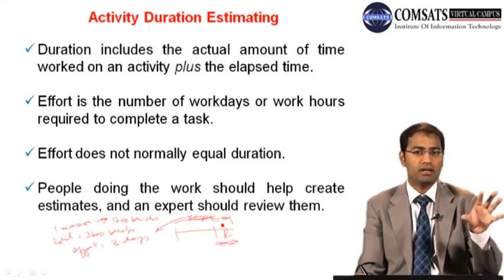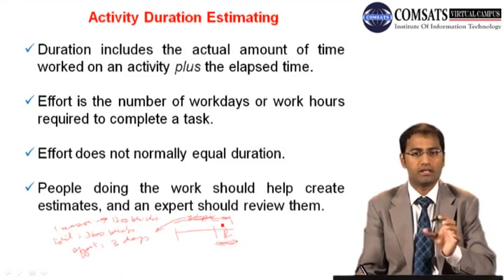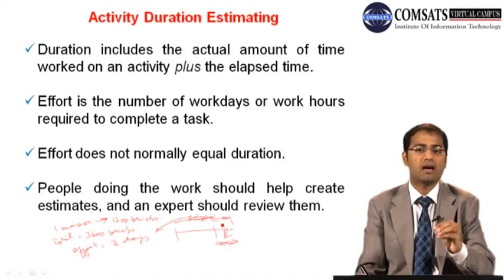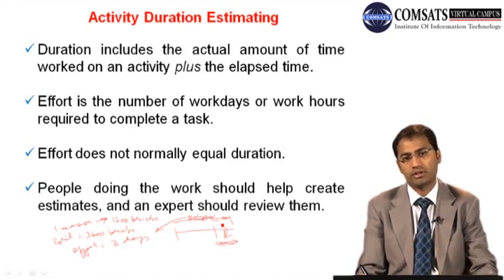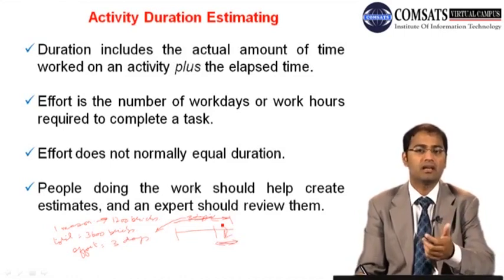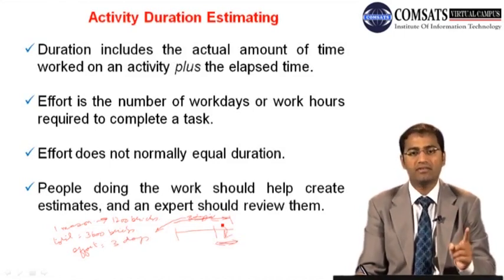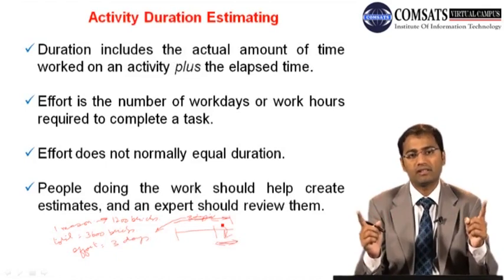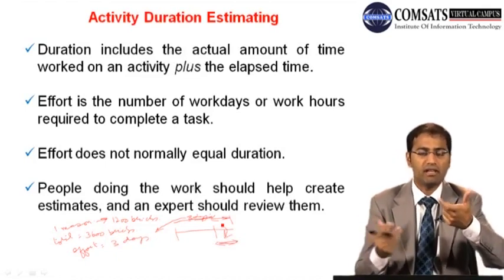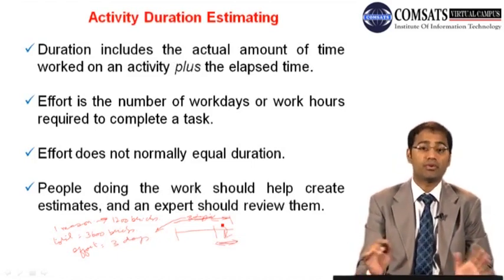But after writing that code, there is an approval procedure: this engineer will submit the code to somebody in a senior position, who may take another week or 2 or a month to validate it. Now the activity duration will be 7 months: 6 months for code writing, the effort, and 1 month just for lapse time. So this is the difference between the duration and effort.